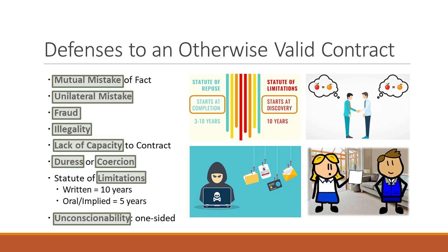But normally, we'll get to that in a couple of weeks when we go through the B101, the AIA contract, that's the owner-architect agreement. It specifically has a section called owner obligations. And in that section, it says land surveys, legal descriptions, and permitting are owner obligations. And that's pretty standard in the industry.